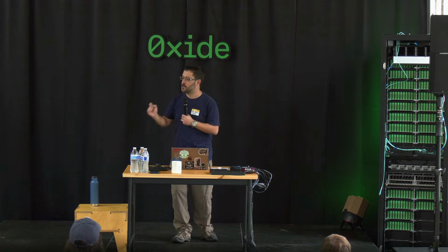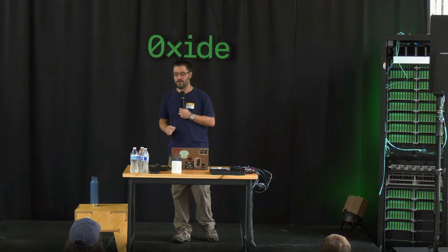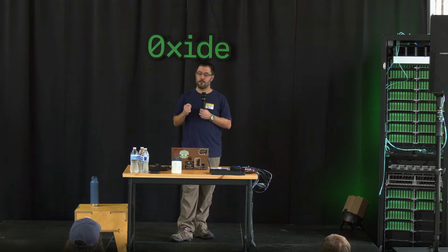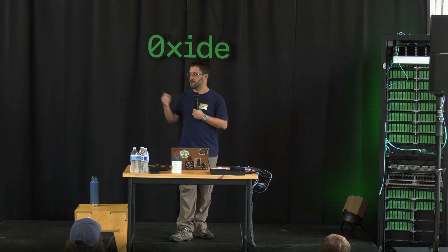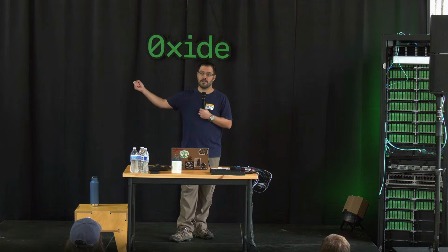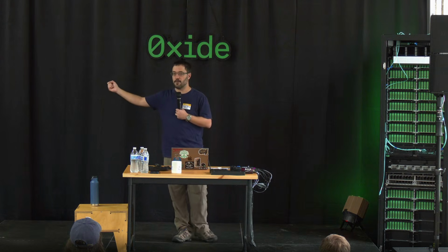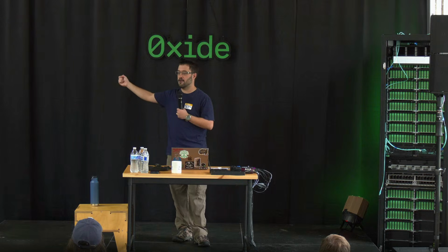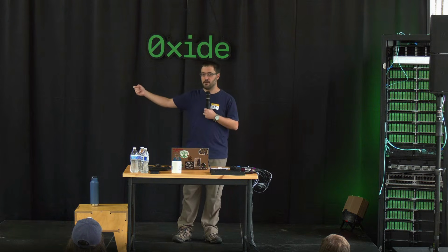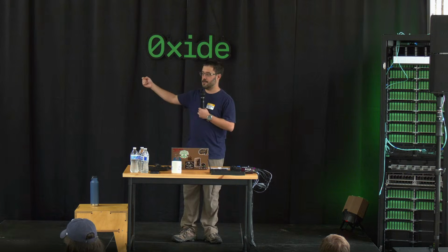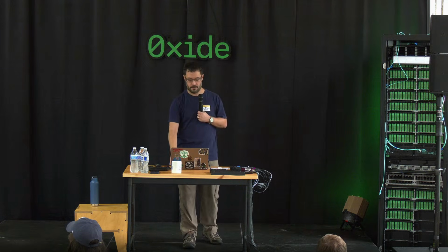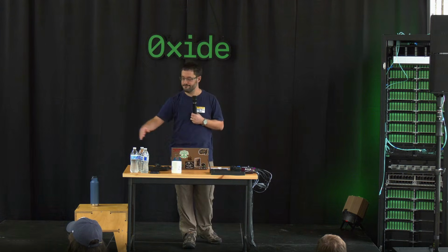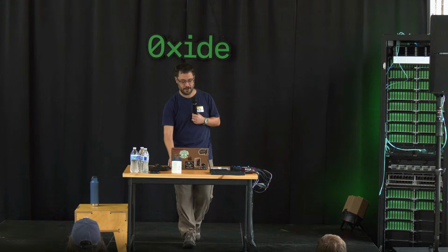So it feels like if we just wait long enough to do the decommission, then we can do this. And we tried a little bit to do that. But the more we got into it, the more we realized we actually can't do this easily. But also, it's not that big a deal if we don't. And that's why, in terms of prioritization, we wound up punting it. And so I'll talk more about that later. But this is what I would call an important non-blocker, which is something we want to go resolve after we ship. It represents an ongoing risk in some sense, but it doesn't have very much impact. It's not actually a very big risk. And so we're not doing it for the initial release. There's lots more here, but not going to talk about it all.